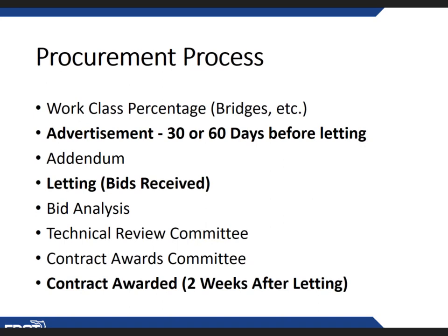Once reviewed, the project goes to a technical review committee, a TRC, to make a recommendation to the contract awards committee. The contract awards committee will consider the technical review committee's recommendation, but they don't exactly have to take it, but they usually do. But before making the decision to award or reject the bids, they will look it over. Then the contract is awarded to the winning bidder.